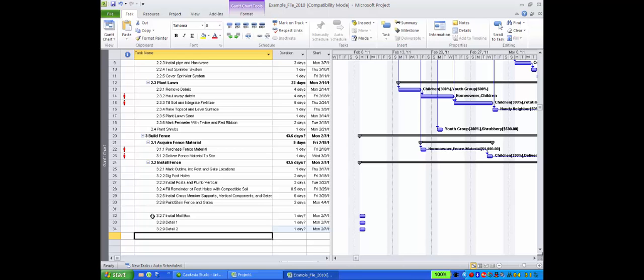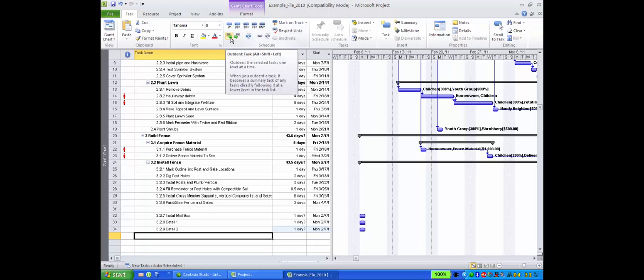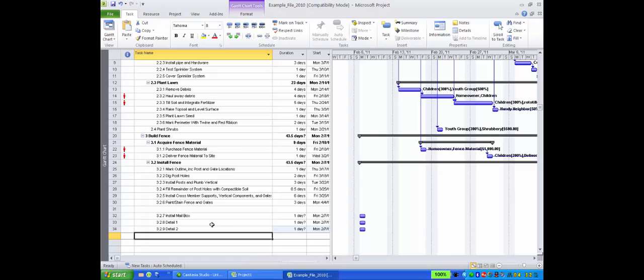In the schedule command group, use the in and out arrows to make these tasks summary tasks or subordinate tasks. The new summary task is not a subset of install fence.